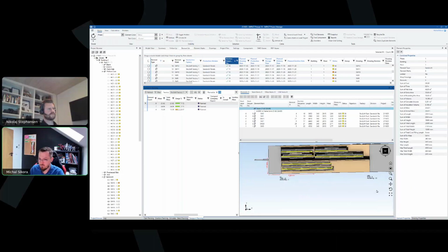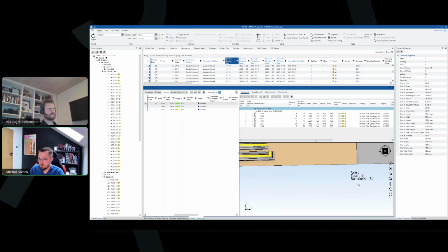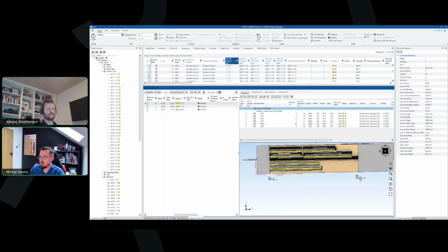Capacity is good. Same thing over the axle. Total is 8 tons probably on the axle, 10 still in capacity. So that's super quick transport. You can, of course, print transport labels, QR codes as well, manage what's loaded and what's not loaded on the transport through the mobile app. But that's another couple of minutes and we're already running out over time.